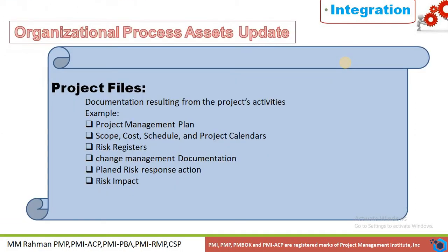Then organizational process asset updates. There are a lot of organizational process assets that will be updated during closing the project or phase. The project files can be the project management plan, scope, cost, schedule and project calendar, risk register, change management documentation, planning, risk response, action, risk impact.